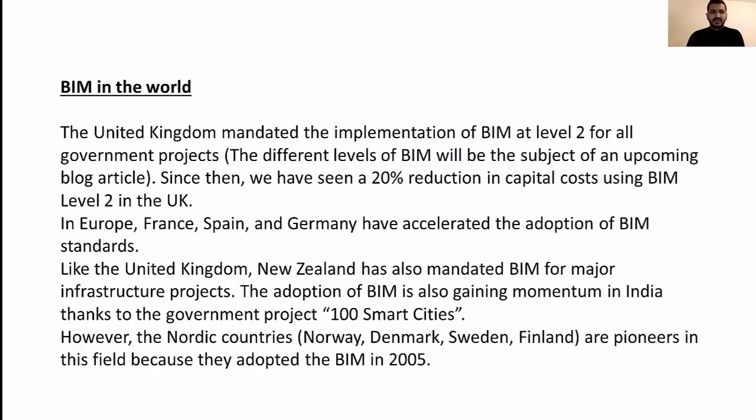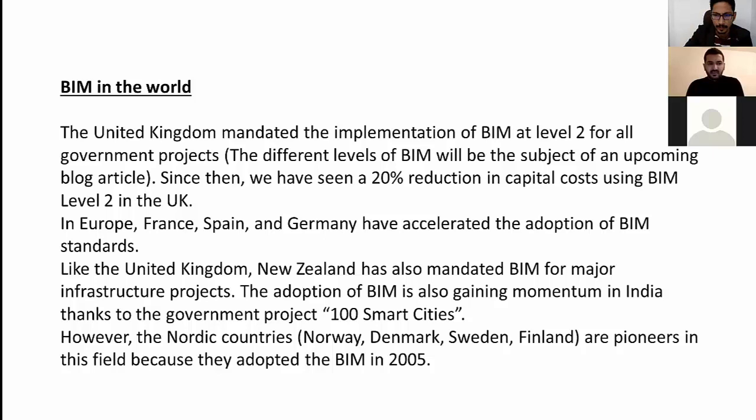At this slide we are talking about BIM in the world. The United Kingdom is one of the best examples to introduce BIM. Implementation of BIM at level 2 for all government projects. The different levels of BIM will be the subject of an upcoming blog article. Since then, we have seen a 20% reduction in capital cost using BIM level 2 in the UK.